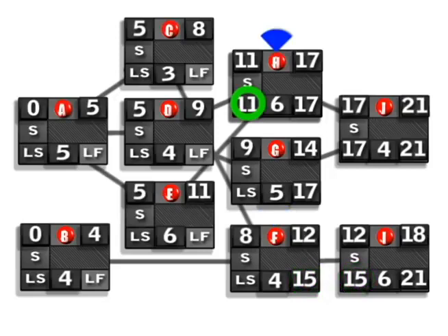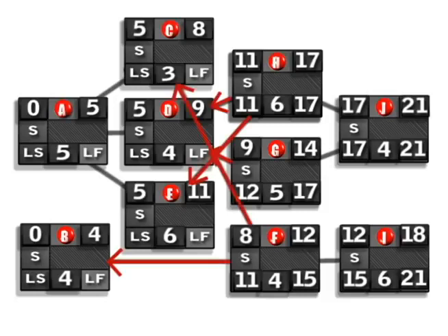17 minus 6 is 11. 17 minus 5 is 12. 15 minus 4 is 11. So now we've got to be a little bit careful because we're back in that situation where we have multiple arrows coming in and out of activities. So let's start with activity